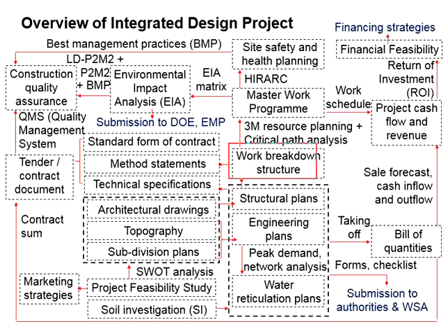How do you work out the work breakdown structure? Again, you have to refer to the plans produced by the engineers and then break down the work into many subtasks leading to the construction of various parts as required in the plans. From the work breakdown structure, there should be the 3M resource planning. 3M means manpower, machinery, and money.